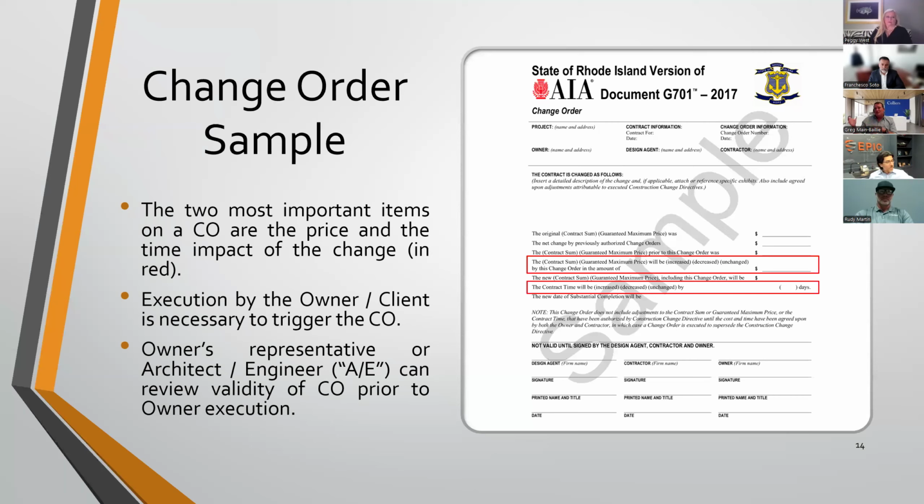And if we feel that 30% of the balconies are deteriorated, then we'll carry that number. What a lot of people do in the market is they put out 100 square feet, 1,000 square feet, 500, and they're very roundish numbers. And we really try and challenge the design teams to bring those numbers to a quantity that makes sense for the project. Otherwise, the unforeseen conditions can explode a little bit.